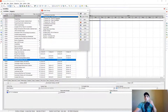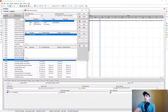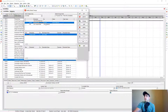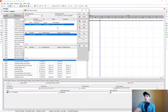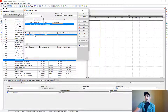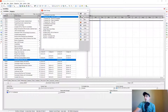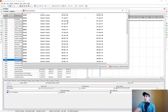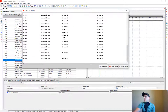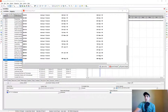We also want to handle finish milestones. The filter is: activity type equals finish milestone and BL1 actual finish is not equal to blank. For those instances, we make the actual finish date equal to the BL1 finish date. Let's apply those changes — the list looks like it's almost already applied except for a few instances. Let's commit those changes.